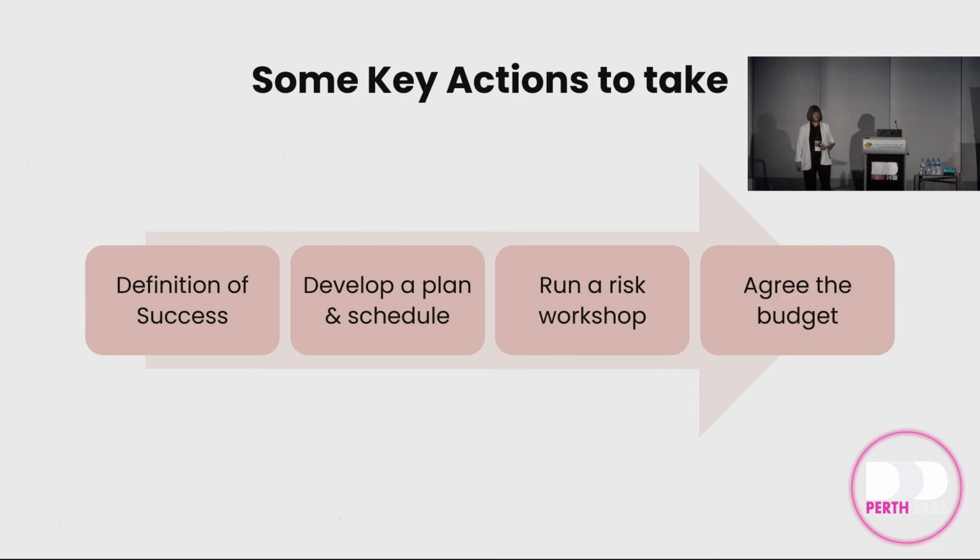And then you can come up with a budget, because we've just doubled the cost of this project with the schedule that I would have come up with in this particular scenario, at least, in order to make it work. Agree the budget. If you can't get agreement on the budget, which includes backfilling your BAU resources or whatever it is, great time to walk away, because it won't succeed. It will go over budget and then everyone will be screaming at you.